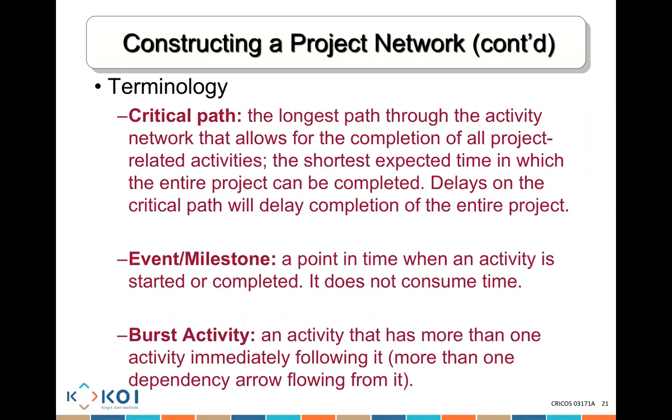Event milestone. A milestone is a point in time when an activity is started or completed. It does not consume time. For example, I might have something that says, module 1 software completed. Did we do any work? Yeah, we did a lot of tasks. But is this module 1 completed milestone doing any job?